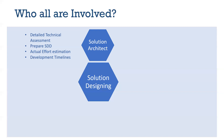Then, the actual effort estimation — how long it will take for a process to get developed, tested, and deployed — is all done in the Solution Design Phase, along with the development timelines and effort involved. There could be a high-level complexity analysis done in the previous phase, but a detailed assessment and timeline could be revised based on this detailed assessment in Solution Design Phase, and should be clearly called out to the client and functional persons to avoid any confusion.